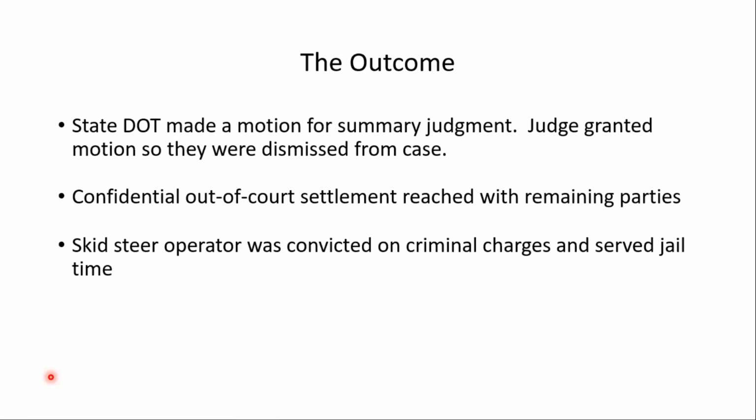Also, one other type of case I had early on related not so much to the actual consequences of the mowing, but the crew had installed in the morning signs indicating that mowing was ahead and the appropriate warning devices. But as the mowing crew went down the road, and they had gone many miles by lunchtime, they failed to move the warning signs, keeping up with the mowing crew.